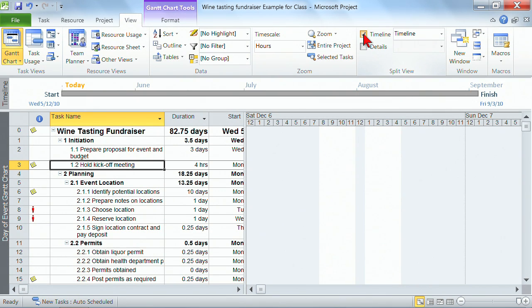So what happens is when you turn this on, you get to visually see in one spot the beginning and the ending dates of the project and then milestones in between. So it's just monthly, June, July, August. So the project starts today, which is May 12th, 2010 in our example, and ends on September 3rd, 2010. That's the finish date. So all this is right now is one line that says visually, here's where we start and here's where we stop. Well, that might be all you need, and all you want is simply to have that big long timeline across the top that's visually available for you.